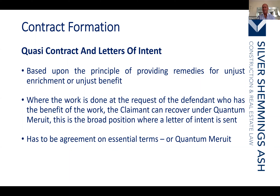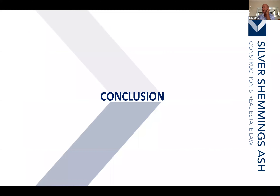Where there is no contract and a letter of intent is in place, the applicable area of law is quasi-contract and restitution. If I've asked you to do something, it is unfair that I have no liability when you carry it out, so I must pay you a reasonable amount — quantum meruit. Quantum meruit equates to a fair market price and, where you've properly sought competitive tenders, cost-plus would generally represent that reasonable amount.